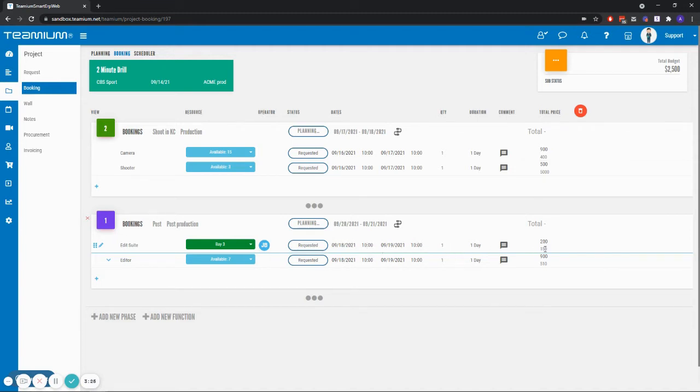The price and cost details that are auto-filled from a rate card if one exists in the system. The total running amount is shown here. Once you have added all the resources, you can click on this button to generate an estimate, a budget, or a quotation, and send it electronically or as a PDF file to the client or supervisor.